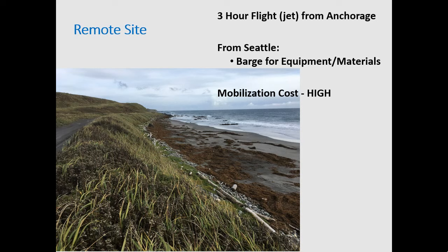So a 10-person jet takes 3 hours. You're not putting stuff on an airplane to send it out there. The barge, rough order of magnitude, every barge is $500 to $1 million just to send a single barge. So your mobilization costs are through the roof. As soon as you can realize any efficiencies in shipping multiple projects together, different materials that weigh less, that are combined, anything you can do pencils out real fast.